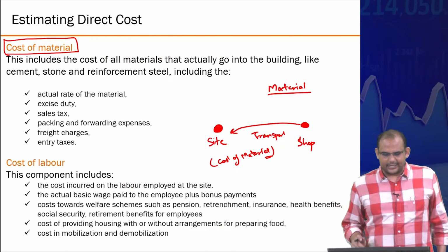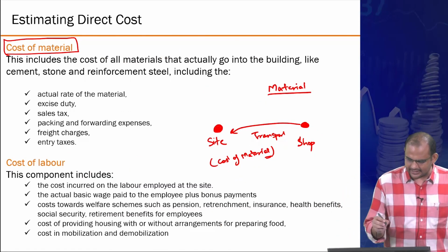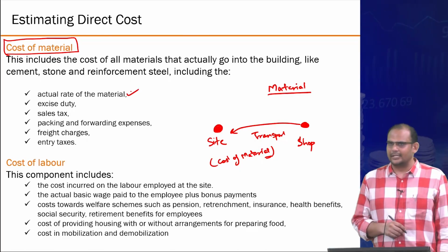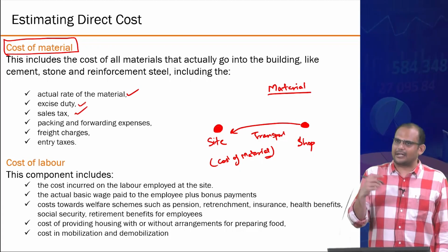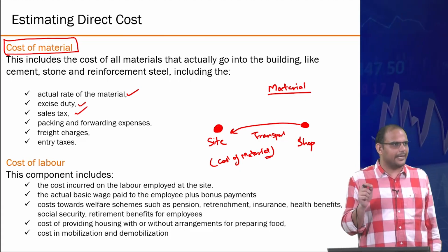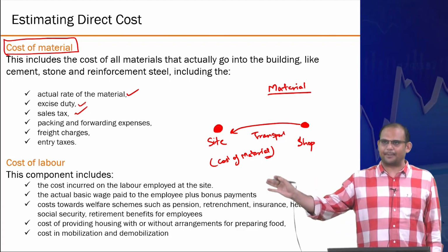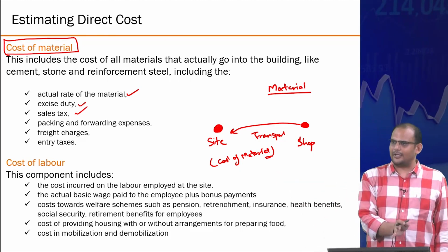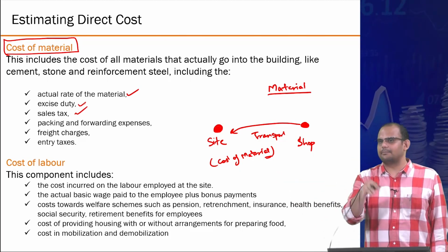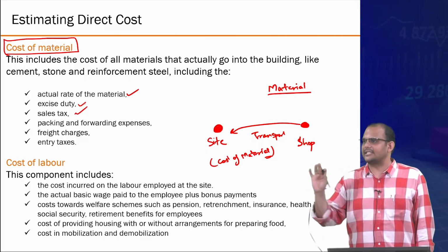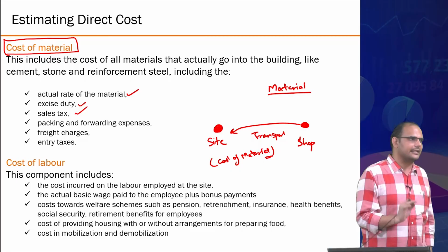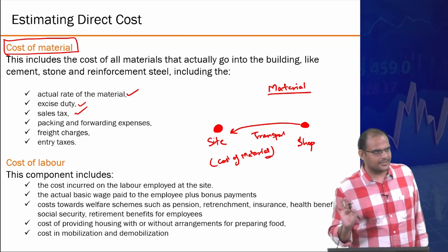All right. So in general, for cost of materials, there is the actual cost of material. Sometimes you need to pay some taxes. Again, if as a company you are interested in how much tax you are paying, then you might tackle the tax separately. But on the other hand, you could say, okay, the lump sum cost of material is 110 rupees instead of 100 rupees. That's the calculation I'll keep and I'll count it completely as the material cost, right?